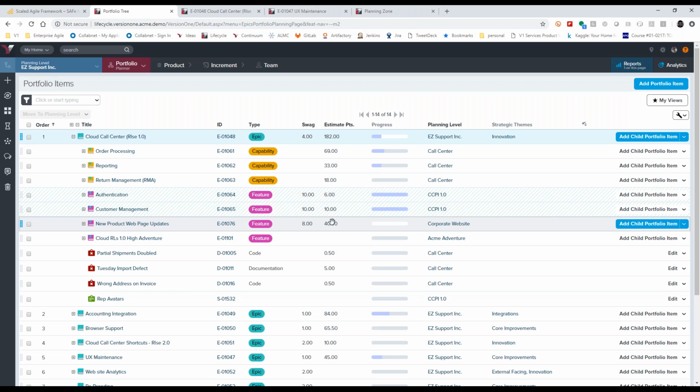So if I understood the question correctly, the response would be primarily at the story level is how we calculate it. At the feature level, where that would add value is if you had featured teams. Where that could pose complexity is if you have any other team alignment, like component teams versus feature teams.